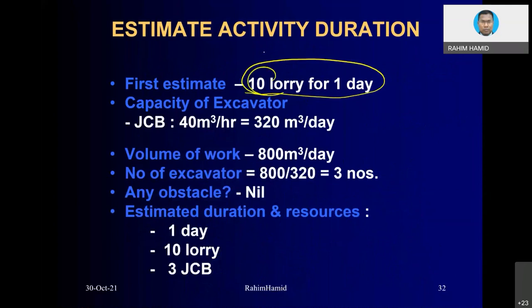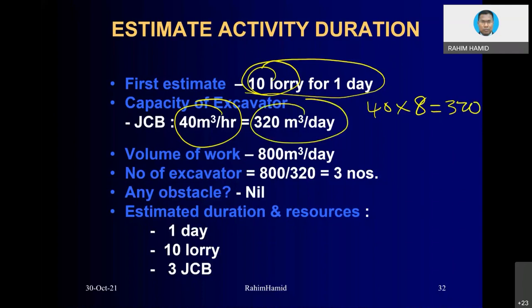How about the excavator? Let's say the excavator can fill in 40 cubic meters per hour, and then in one day, 40 times 8 hours, it turns out to be 320. This is in one day. But if we have this kind of quantity, you have to divide by the number of days, then you need 3 excavators. Then only the lorry and the excavator can be synchronized. You can finish up the project in one day. So these are the things.